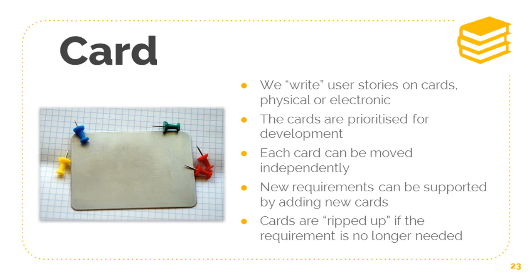The collected user stories form the product backlog, but not all of those cards in the backlog have to have a fully formed user story written on them for progress to be made. The most important items can be developed, with lesser functionality being deferred until later. For example, let's take the example of Facebook. The product has been developed over a period of time, with new features being added all the time.